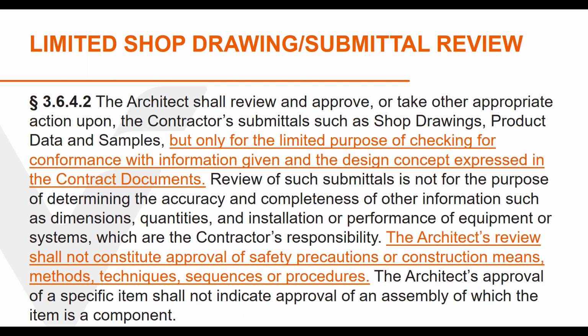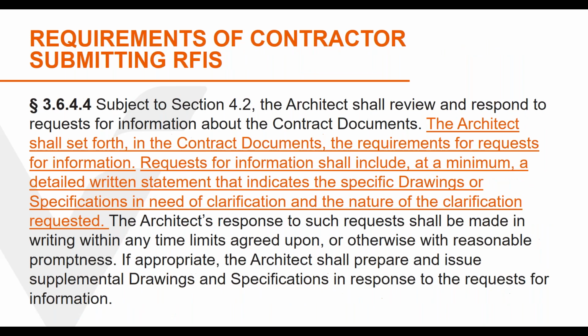Some owners want the review to ensure or guarantee conformance or otherwise elevate the shop drawing and submittal process beyond its intended reason for existence. This language means that the contractor has to meet the requirements of the contract documents, even if a required shop drawing was reviewed and approved.